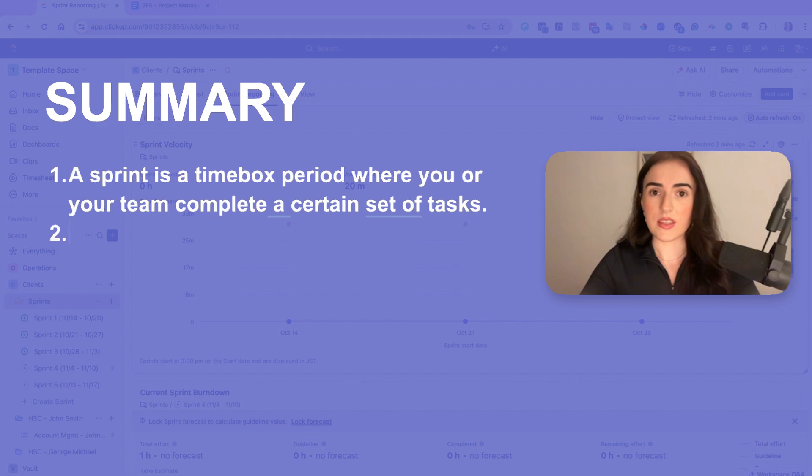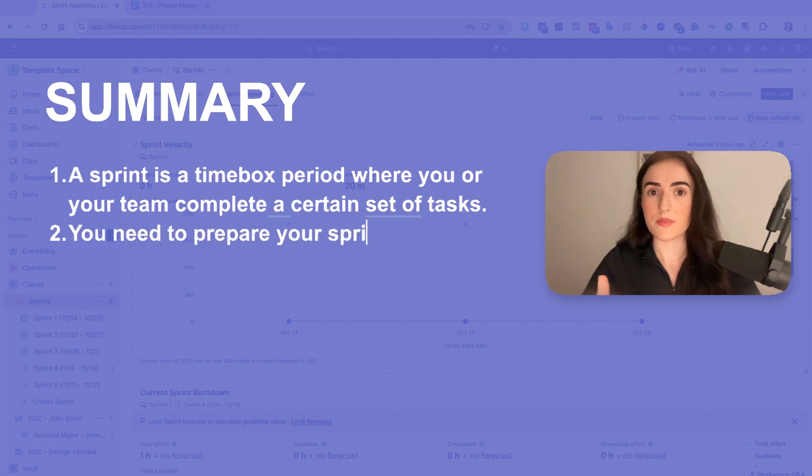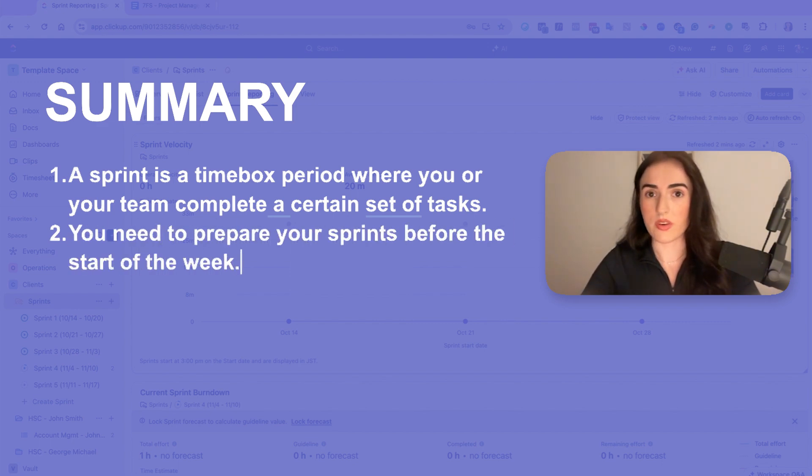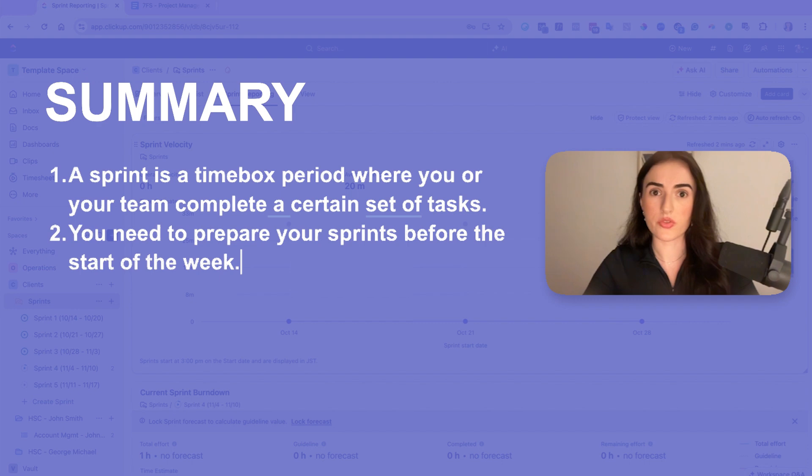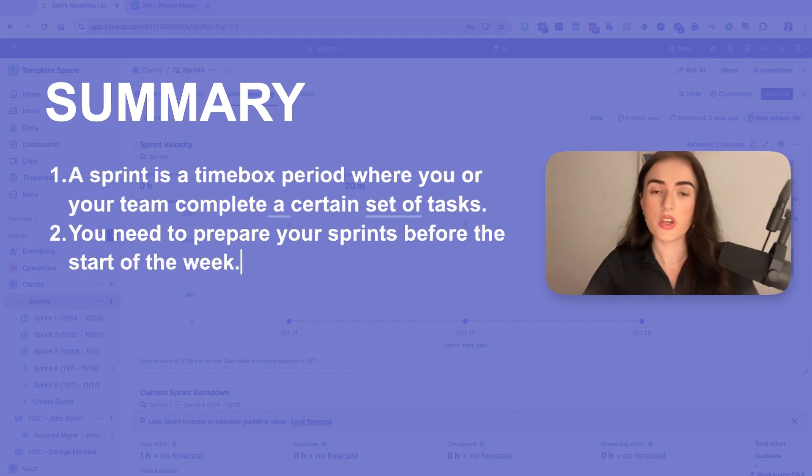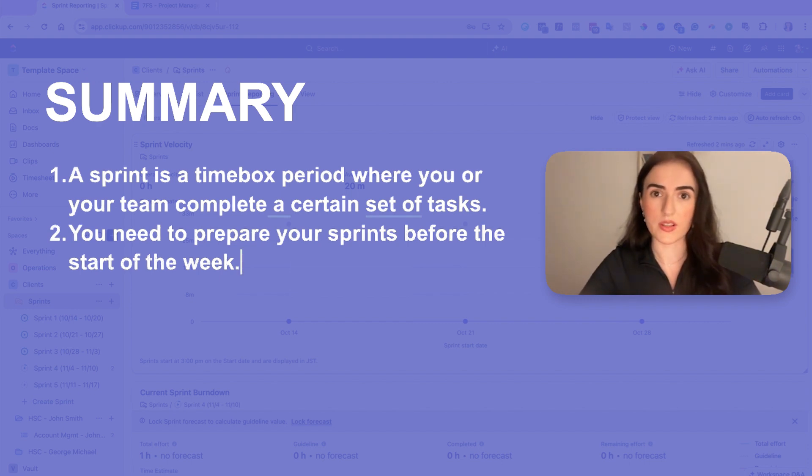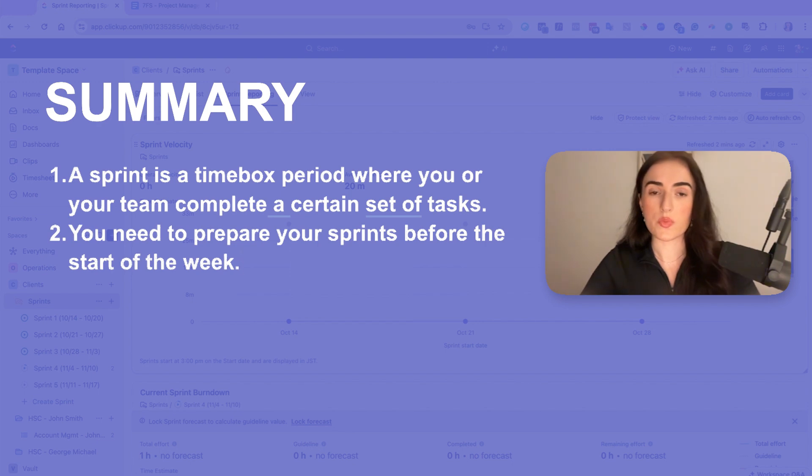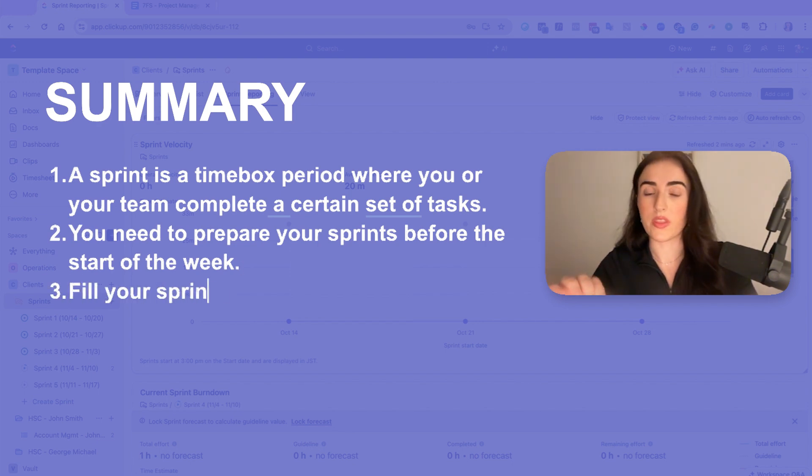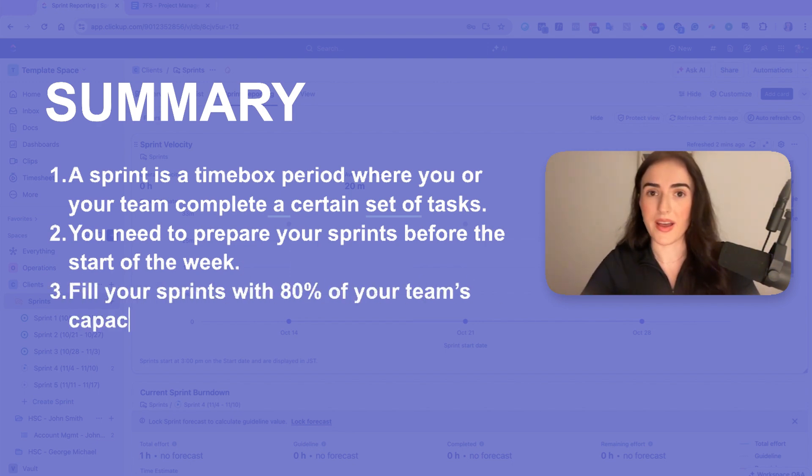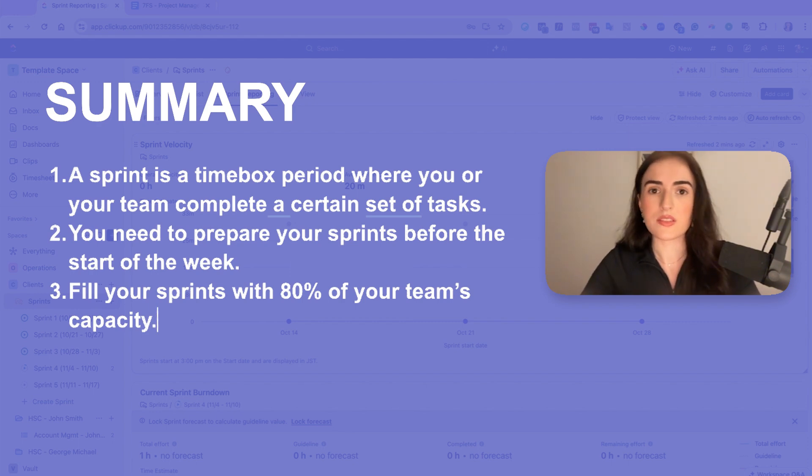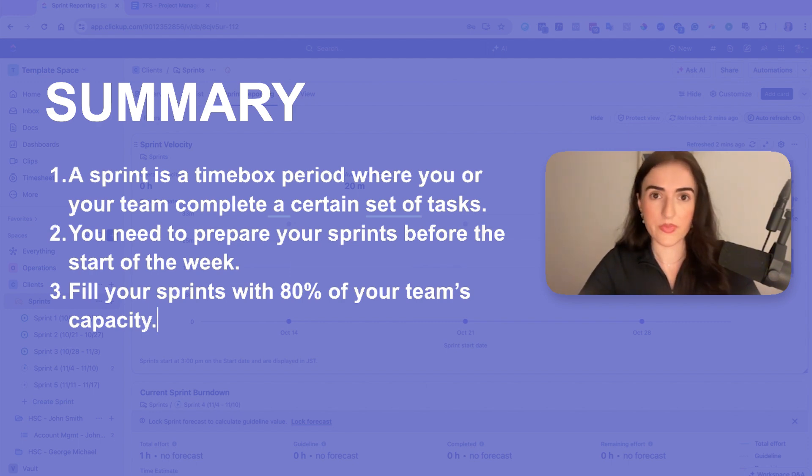The next thing is you need to prepare your sprints before the start of the week. So every Thursday or Friday, you as a project manager with the business owner, you need to work together to prepare the goals for next week. And then when you're creating those sprints, you always need to fill it up with 80% of your team's capacity or even 70%. So that means you have time for urgent or last-minute tasks.